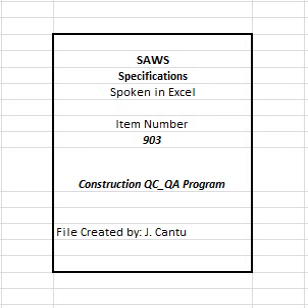8. Assurance testing. Quality assurance, QA, testing is necessary to assure a quality project. SAWS performs QA testing to verify that QC testing is accomplishing the specified objectives. QA testing can be performed by either SAWS personnel or an independent testing laboratory. Specific scope and objectives include